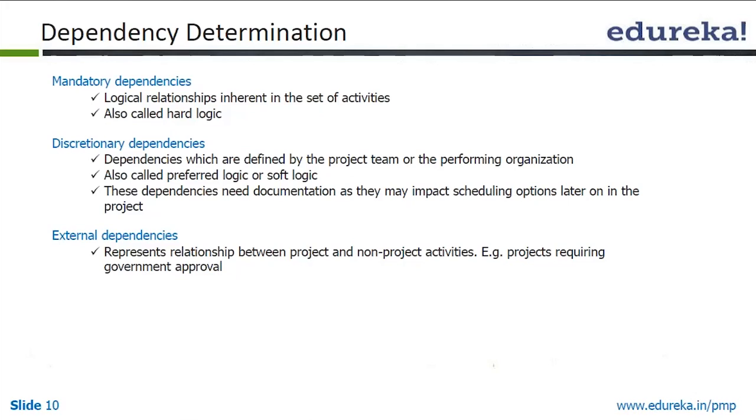Why have we put that discretionary 3 more days? Because it is monsoon time, it is raining, and the glue will not stick well unless it is given some time. So that is a discretionary dependency which you have given of 3 days for the glue to stick better in a monsoon environment.